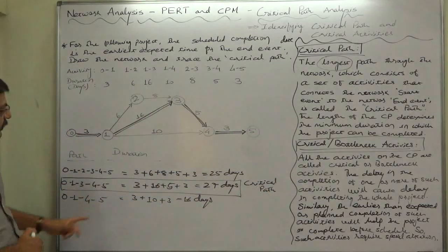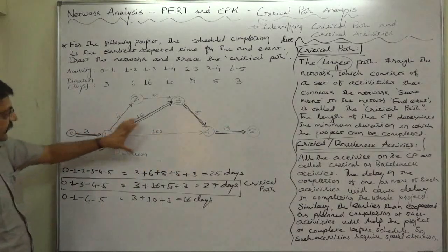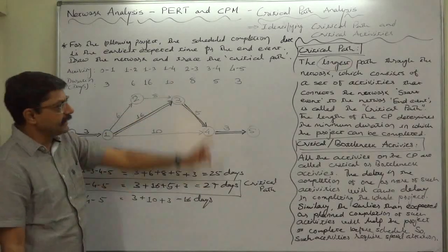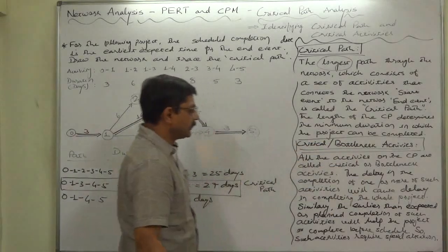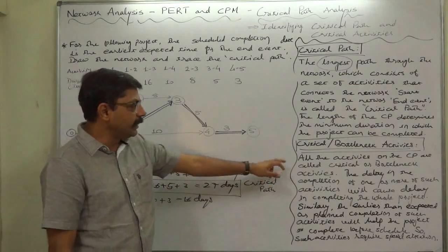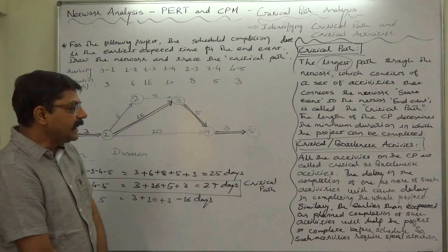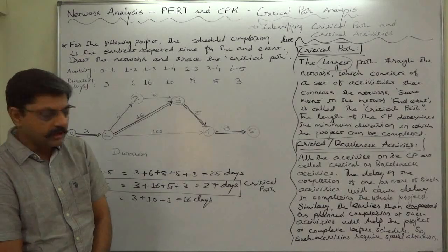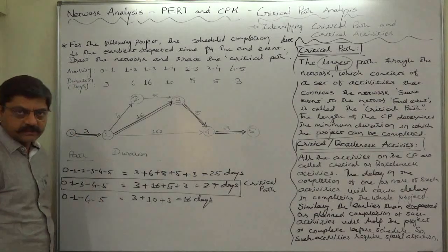The longest path from start event to end event covering various activities is the critical path, and 27 days is the minimum duration in which this project can be completed. Now, another point: critical or bottleneck activities. All the activities on the critical path are called critical or bottleneck activities. A delay in the completion of one or more of these critical or bottleneck activities will cause delay in completing the whole project.